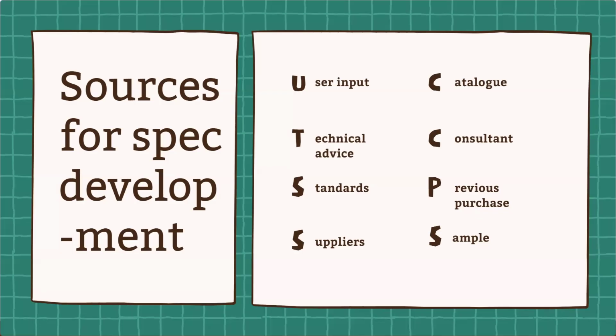With market dialogue, it means that we are not sure about what we need, so we may issue the request for proposal, and the supplier may reply with some proposal, with some technical proposal and their financial suggestion. So we look at those proposals, and we consider which kind of proposal may fit our expectation.